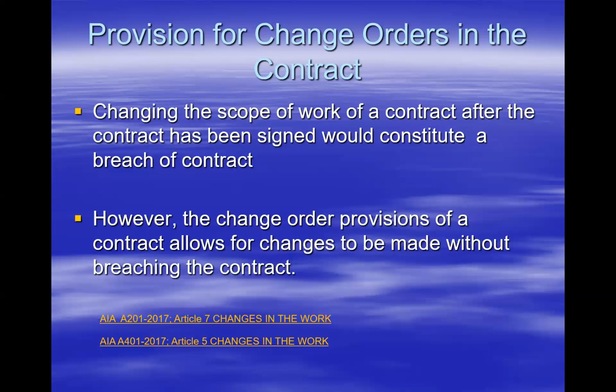If a contract is written very narrowly or very rigidly, it leaves the contracting parties with very little maneuverability. Then potentially you have to perform per exact print of that contract, and any deviation from that could constitute either a minor or a material breach of contract.